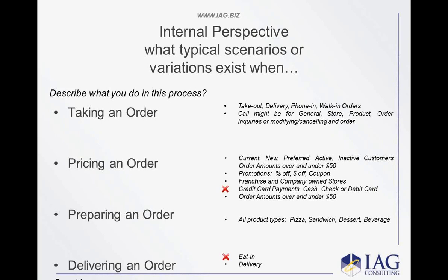You're right, that's not part of our process. We've got Karen over there in another area, she's doing that particular thing. We're not talking about eat-in, it's also delivery. So we're not talking about the store management system and store inventory management. We're only talking about the call-in center's customer management system. Fabulous. That really narrows down the scope of what we now need to deal with, and it helps you identify the variations that you now need to talk about.